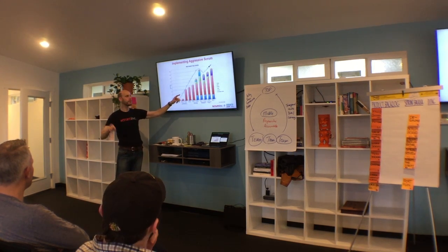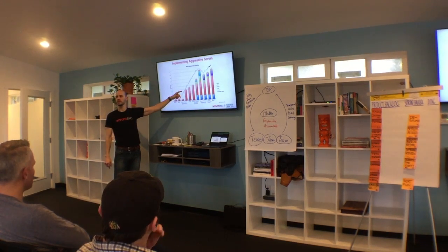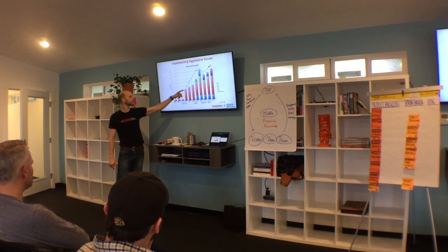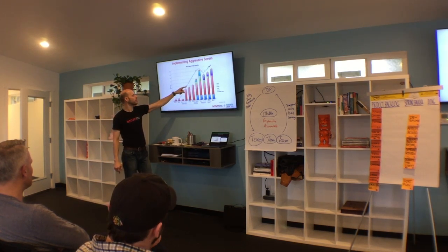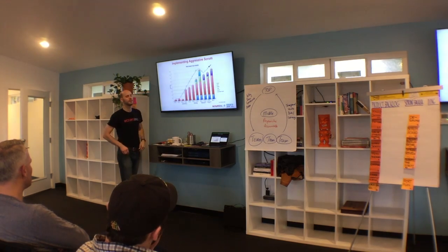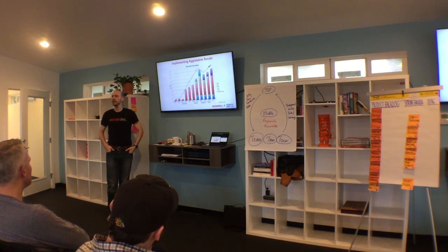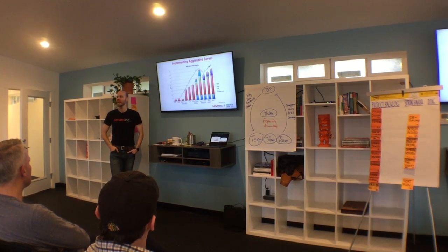And the output per amount of time went up to 61 points, 6x, because context switching was shut off more than it ever had been. And it continues to climb as they remove impediments each sprint, as you would expect. Then it jumps again to 115, 11x their previous velocity. Per developer, they're putting out as much work as 11 people. This is hardware and software together, same team.